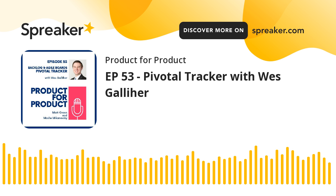And then that will move that story. I use air quotes around move, because it moves just visibly. The button changes to a finish state, so that when the developer is finished, they can click finish. Depending on how your workflows go, for us, that means it is done coding in our development environment. And then when they deliver it to the QA environment, that's when they click finish to go to the deliver state. That then puts it in an accept or reject state for the product manager to go review it in QA, and then accept or reject the story. Once it's accepted, it moves into done and out of your view. So it is technically a Kanban, but it's just in button state changes.